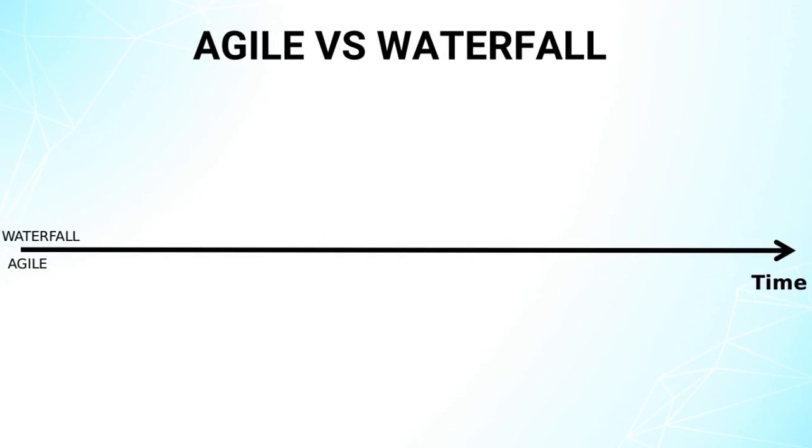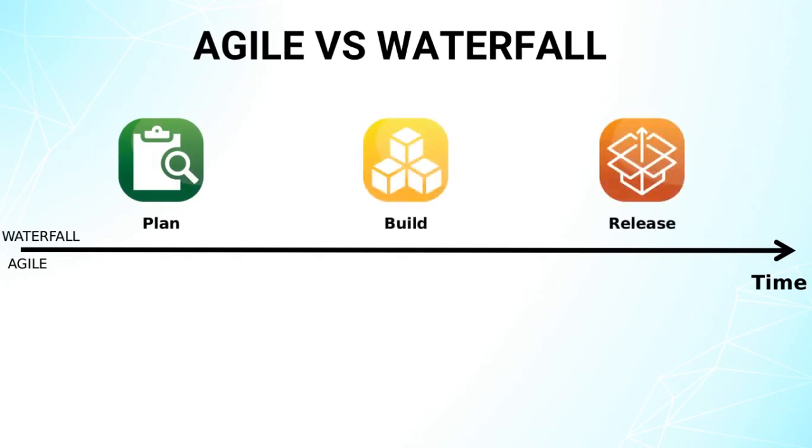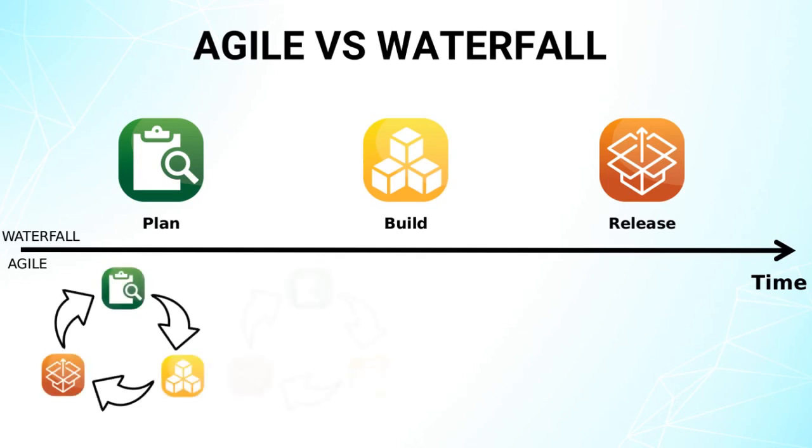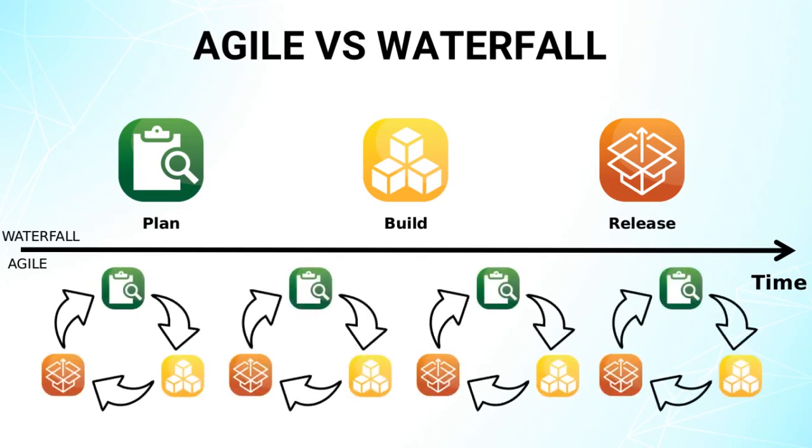Now, hopefully, you are beginning to see the clear difference between Agile and Waterfall approaches. In Waterfall, you are effectively performing one giant iteration of the scientific method, with the entire product being built phase by phase. In the Agile approach, there are many small iterations where small batch sizes go through each of the phases relatively quickly. The end of the iteration results in a product increment that is usable by the customer. The Agile approach provides the benefits of rapid feedback, and because planning is continuously happening, the product can adapt quickly.